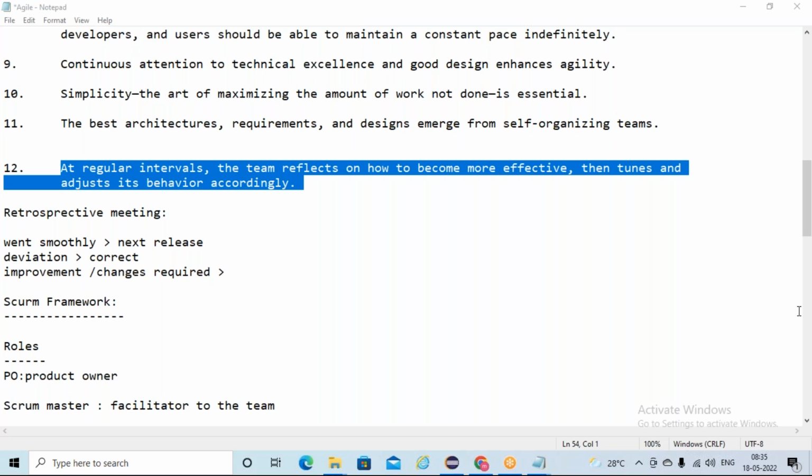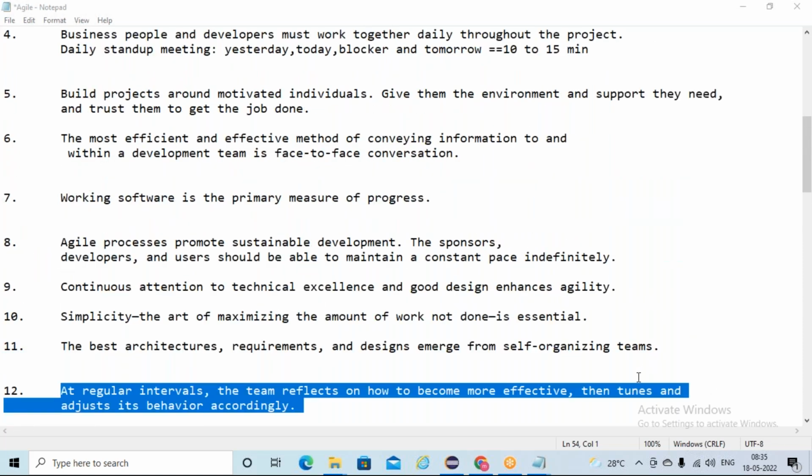And again at the completion of the second sprint, another meeting. We check whether the points we raised in the last sprint have been corrected or not. If corrected, okay; if not corrected, we have to implement them in the coming sprint, so that our work goes more smoothly without any interruptions. Are you getting this point, everybody?